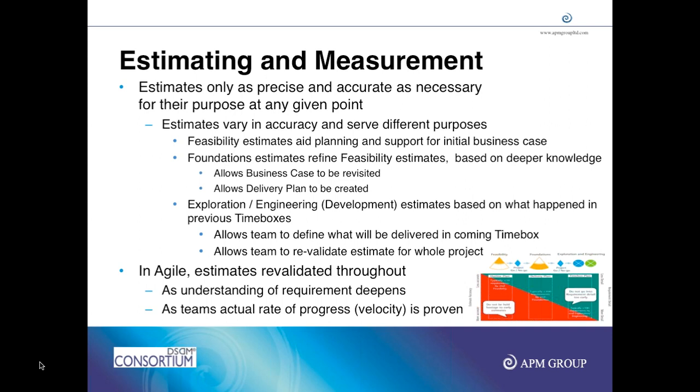A story point is nothing but a number given to a particular story, and you derive this number based on comparing it with the previous things that you have done. Like if it is user logon functionality, I can give it a number 3 based on some kind of logic we use within our company.